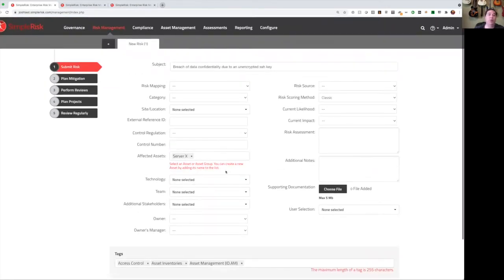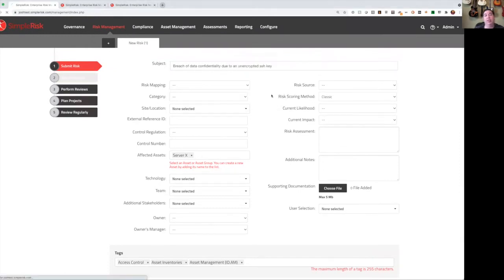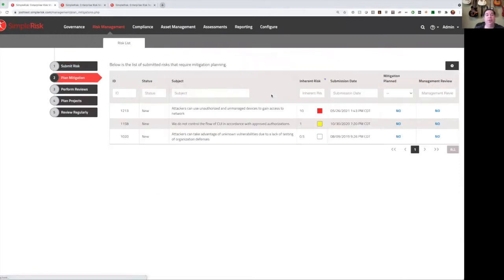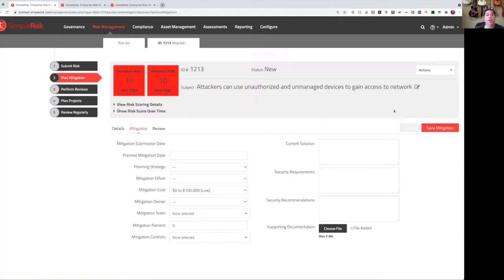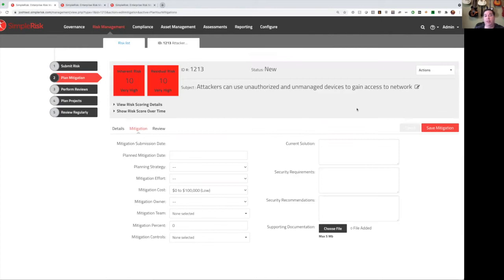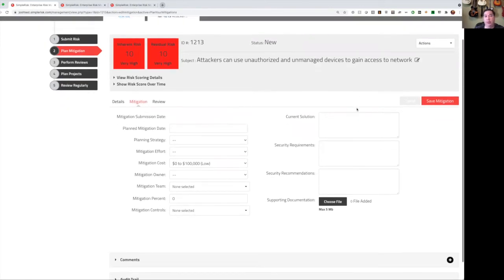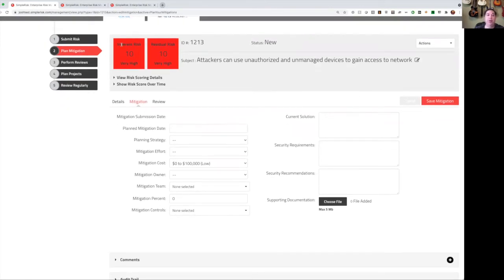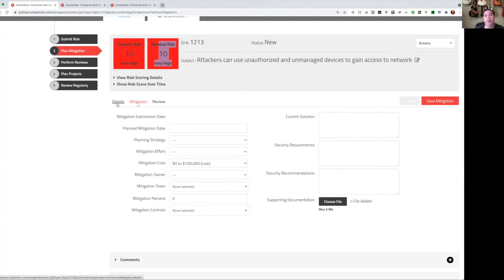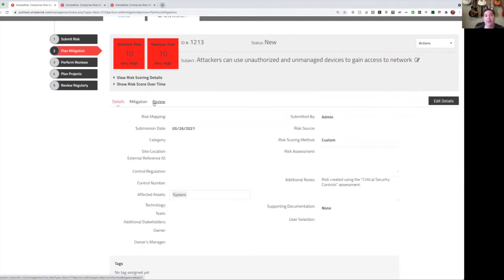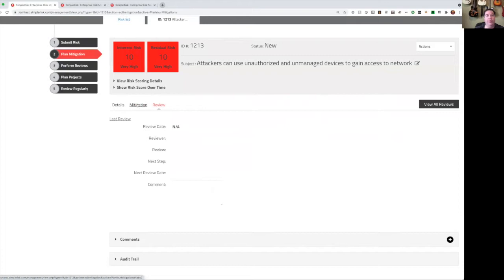You can also add tags to SimpleRisk. Each risk can have a many-to-many relationship between risks and tags. And you can filter, sort, and group based on those tags in the dynamic risk report. Now, once you've submitted the risk, the next step would be to plan a mitigation for that risk. And this page will show you every risk that does not have a mitigation plan for it yet, ordered by the highest inherent risk score on down. So simply start at the top and click on no. This will bring us to the page to plan the mitigation for this risk.